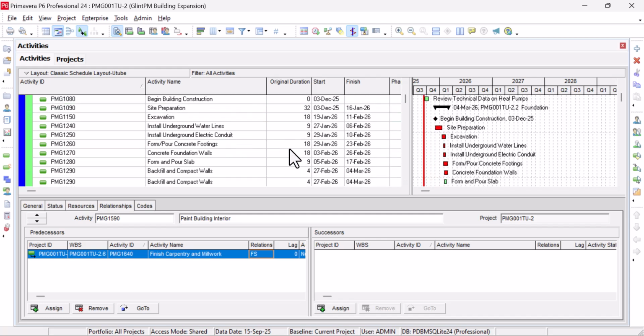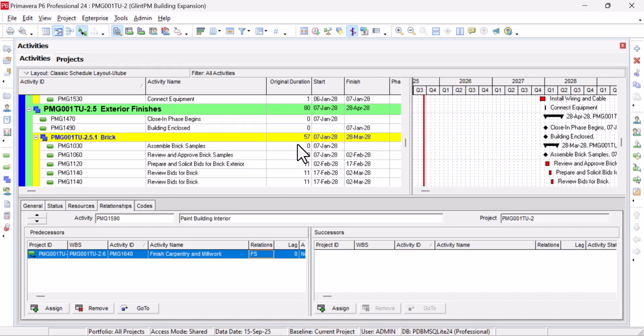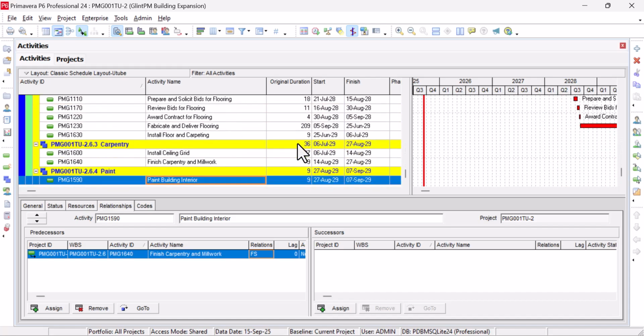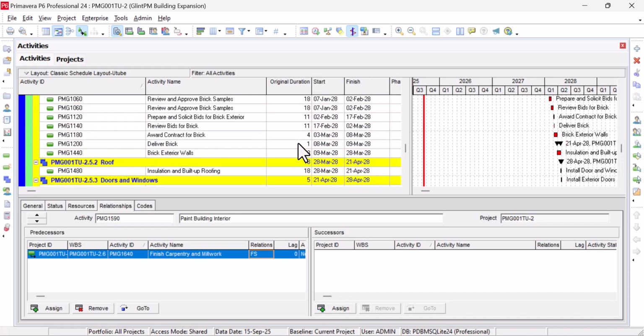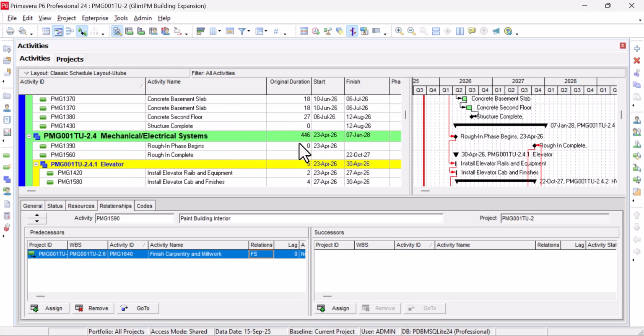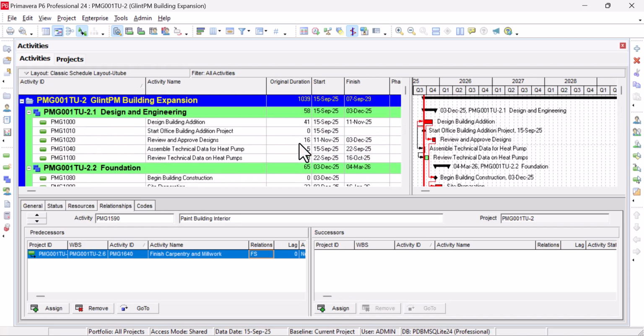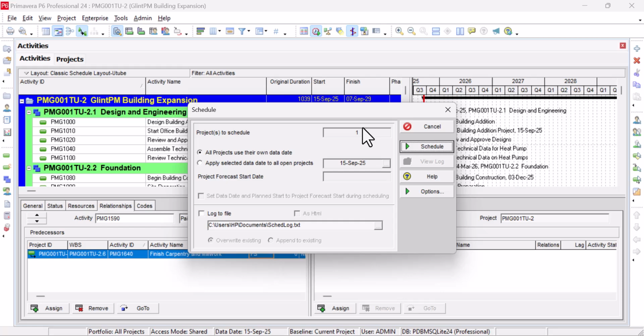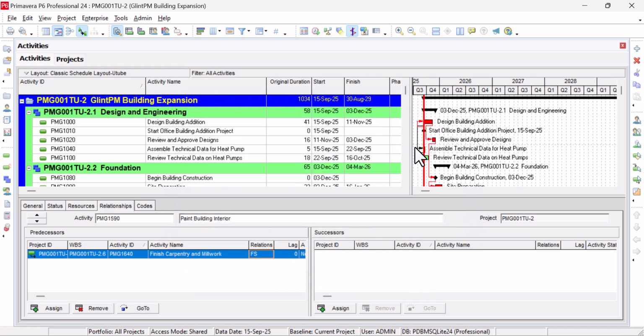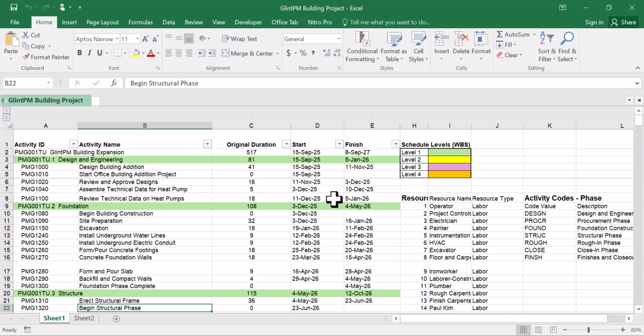Okay, what do we mean by it makes sense? Can the activities run together when I'm making it finish to start? It's supposed to be start to start, but I'm making it finish to start. Then take note, I said you run the schedule to see the changes. By the time you run it, the date will change, and you align based on the change